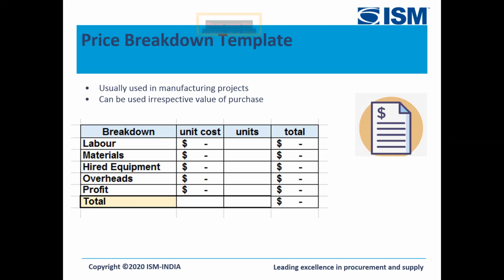So if, for example, you're asking for a project which would be completely turnkey, and even in the case of a single sourcing strategy, it will help you to compare those labor costs with the benchmark costs. It will help you to understand what material costs can roughly be estimated. And if there are multiple suppliers, then you can compare not only the cumulative cost but also the individual breakdown cost.